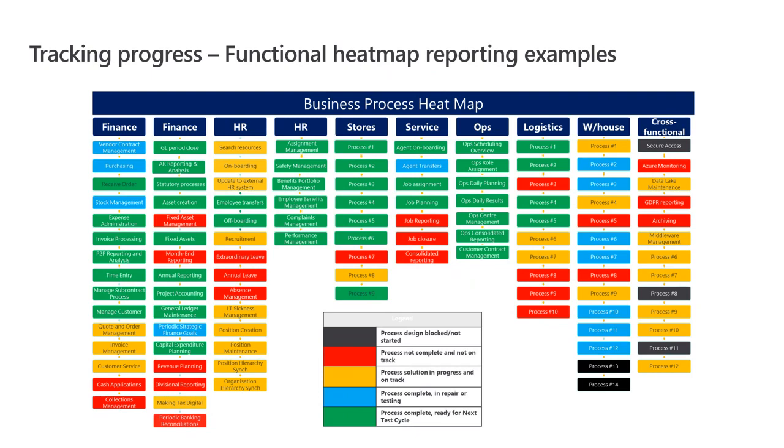So looking at this, I can easily see, oh, look, I'm blocked on warehouse. I've got 2 blocked things, and I've got 5 things that have been in test for a while. Is there a quality issue? Why is it going through repeated test cycles? I've got 2 things that are delayed. I've got 3 things that are not done, but they're telling me they're on track. I ought to pay some attention to the warehousing work stream.